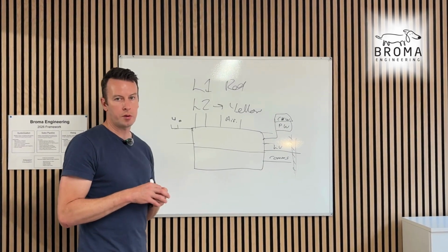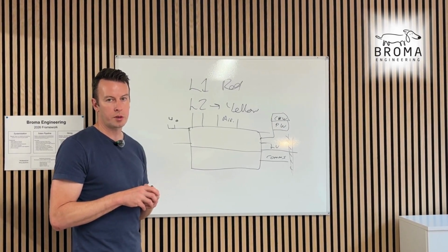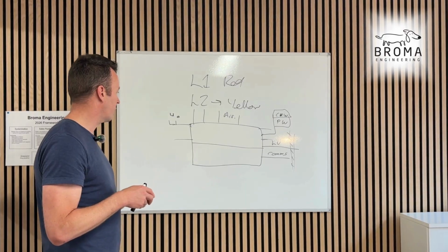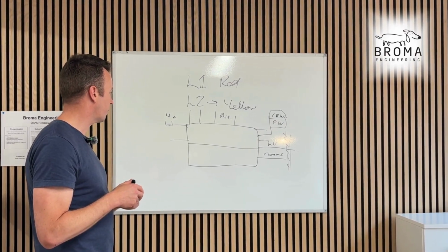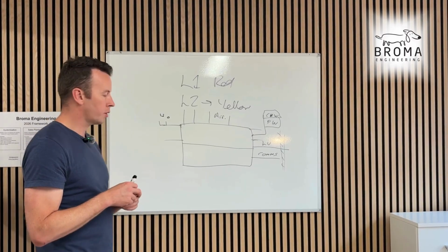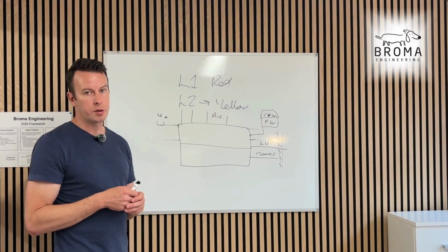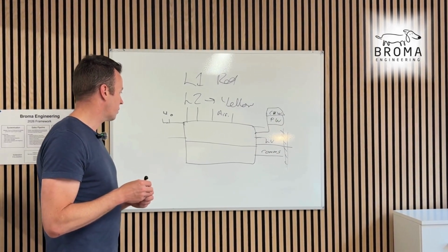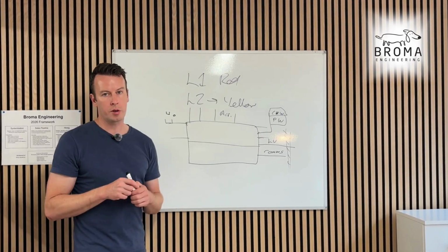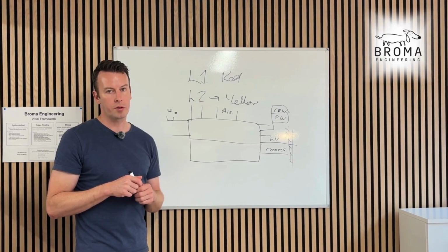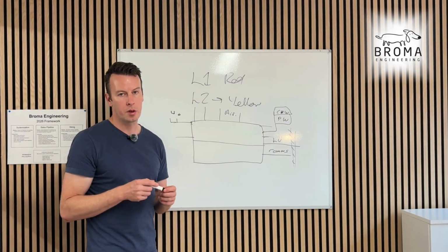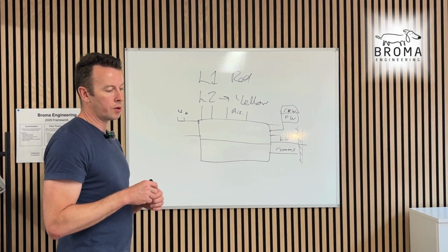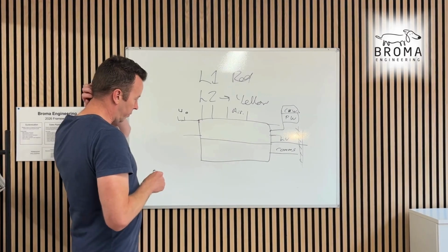Same for the pipework, that you know exactly how pipework is going in, it's modeled in detail. So you've a high level of detail in that model. You know exactly what you need to do. It's not just a representation of a pipe. I'd actually just model it all at this stage. We have the technology, get it done, put the right joints in, get every component modeled so the team on the ground can use augmented reality or use computers on the site to know exactly where everything goes, and there's no confusion. It's a very powerful way of getting it done.